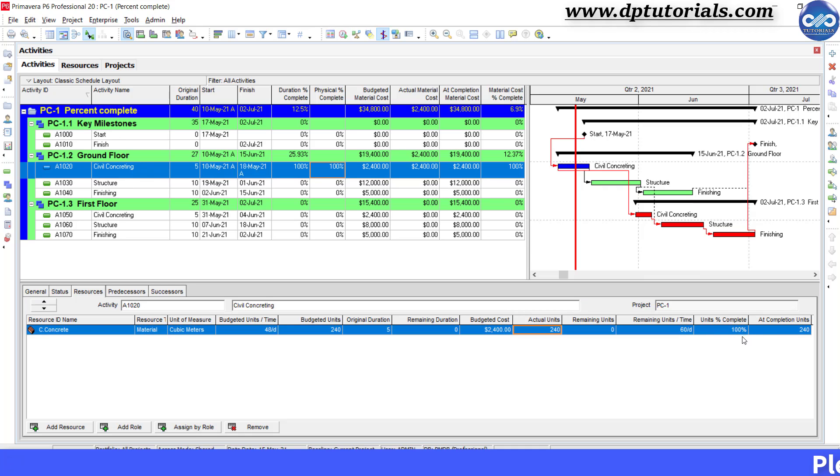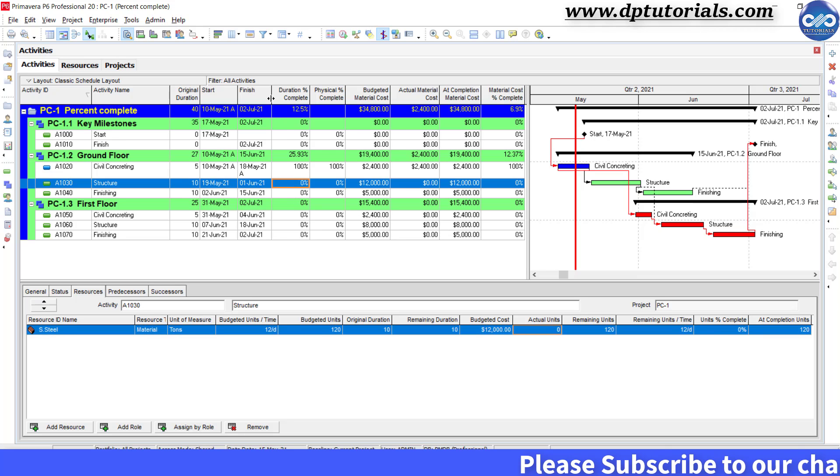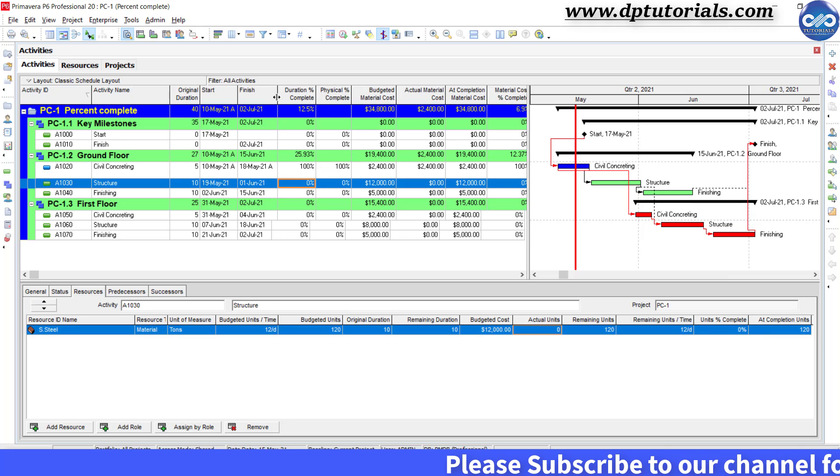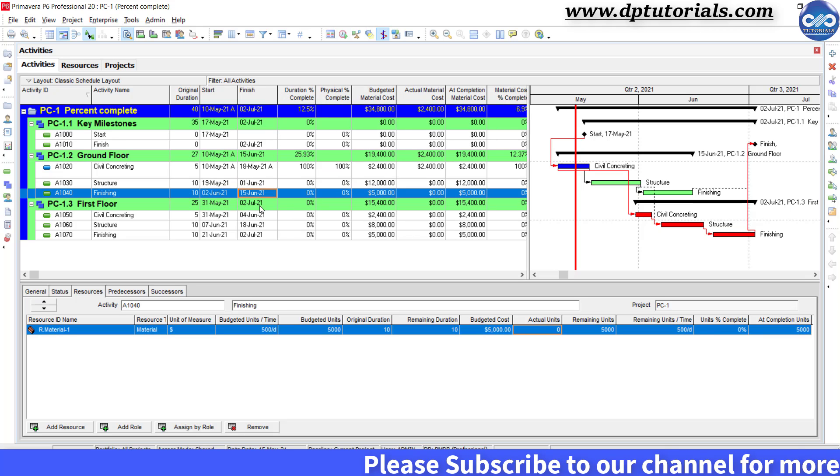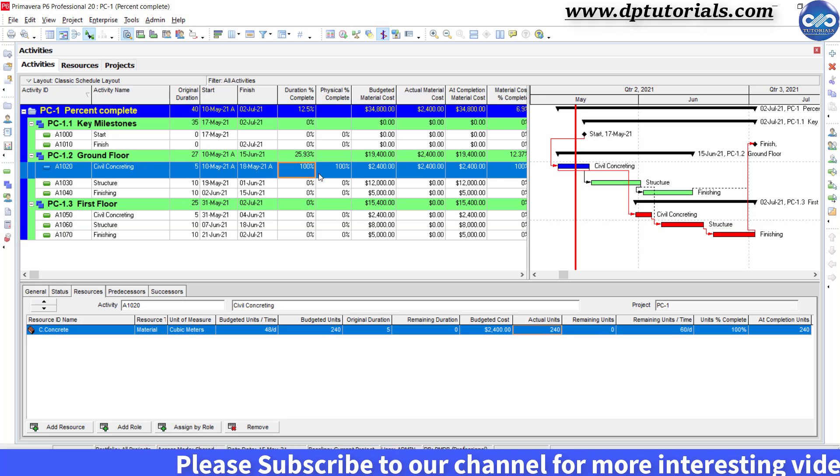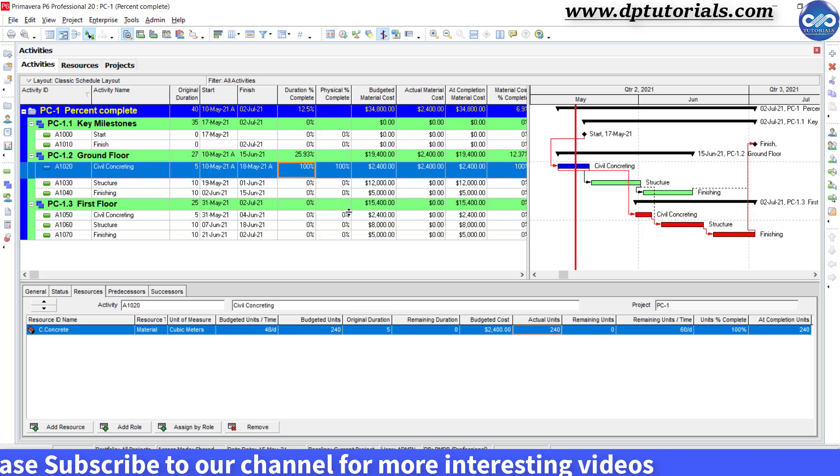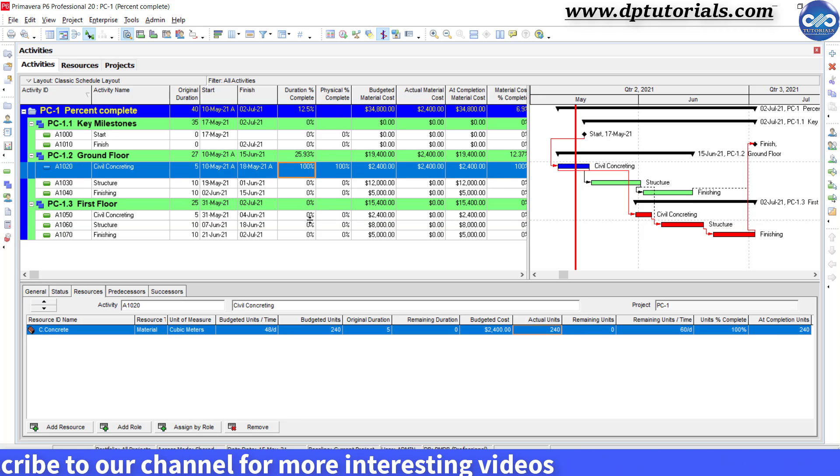Similarly, if you do an update for all the material resources in your project, you can give the physical percentage complete for those activities in addition to the regular duration percentage complete as well.